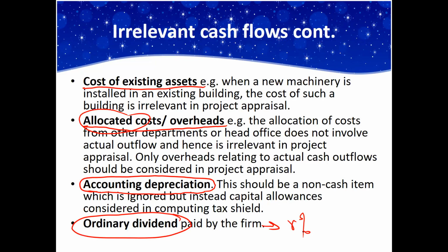The R%. So all the different returns you pay to the capital providers, the equity shareholders, the debt holders, the bank loan, they're taken care of by the discount rate, the R%. Therefore, all those returns to those providers of capital are considered, in quotes, to be irrelevant. But they're relevant, but they're taken care of by the R% here. Clear?